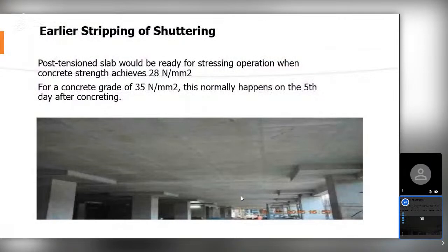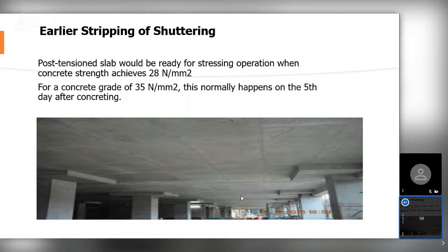Regarding early stripping of shuttering: in the construction industry, manpower, material, and machinery are the three components deciding the commercials of any contract. Effective utilization of material enhances cost efficiency and profitability. By using post-tensioning, we can reduce the stripping time of concrete. Normally, with a conventional slab, stripping time is around 28 days as per IS code. With PT system, we can remove the shuttering within 10 days, enhancing cycle time and productivity of material.